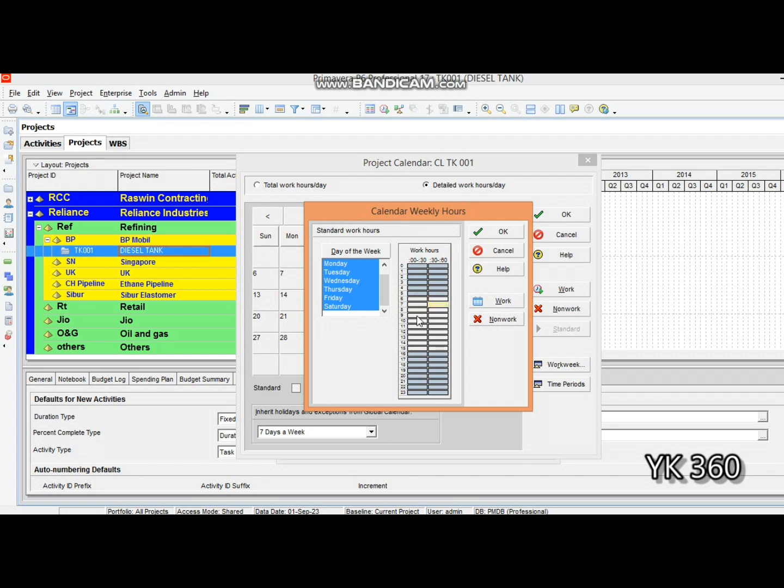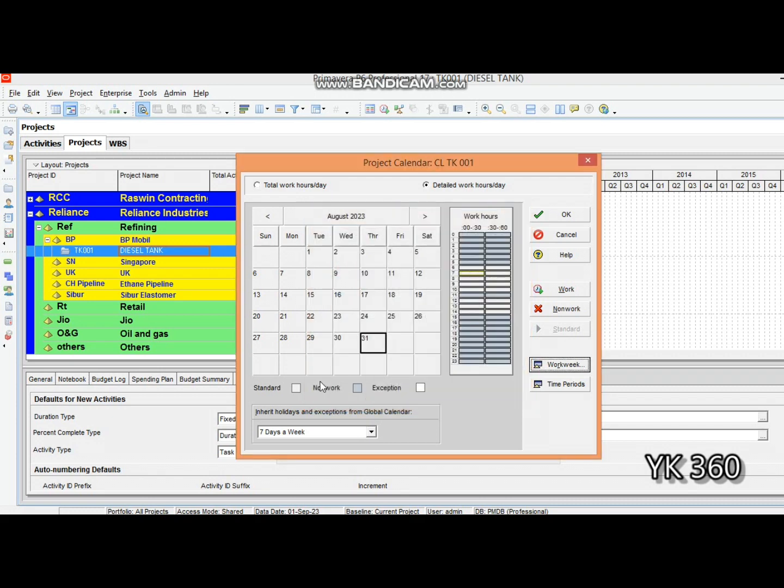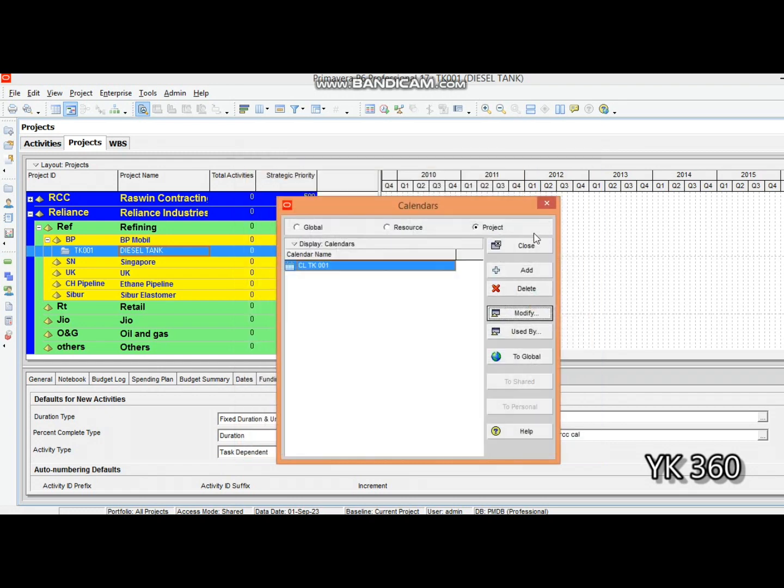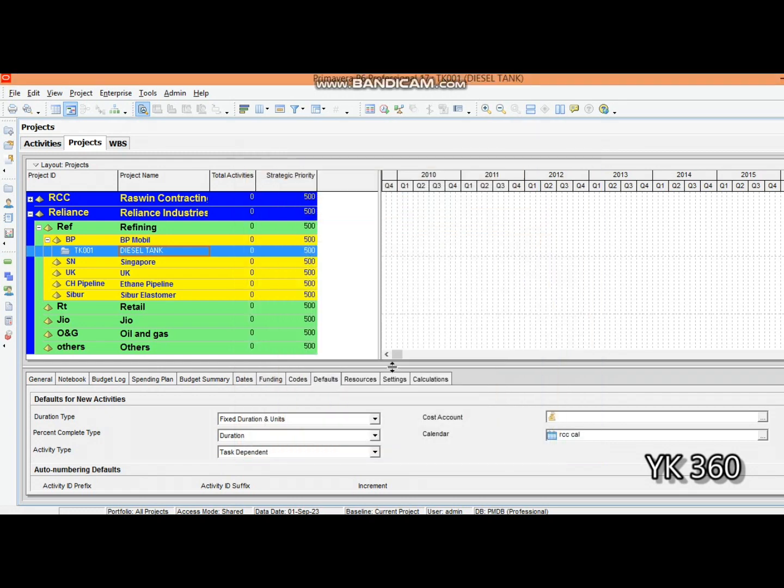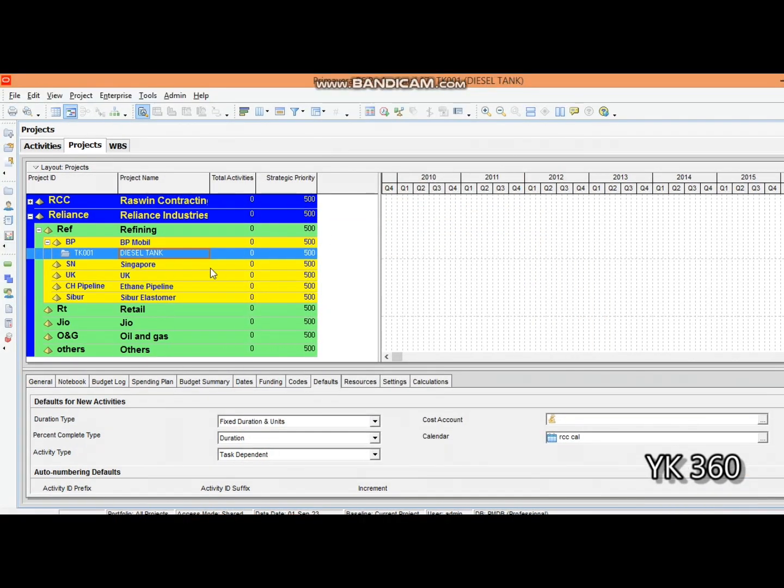We have the lunch break at 11 o'clock, so I will make this non-working hours from 11 to 12. Then 12 to 3 is working. Now you can see one, two, three, four, five, six, seven, eight hours total - eight hours a day working hours. We have finished assigning the hours. Click OK, then click Close. We have successfully created the calendar.